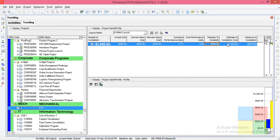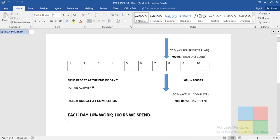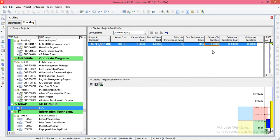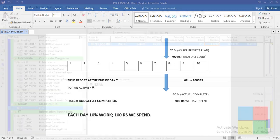Estimated at Complete (EAC) is 1400, which is 500 plus 900. It is the total amount you are going to spend from the beginning to the end of the project. It is nothing but the Actual Cost so far (900) plus the Estimate to Complete (500).